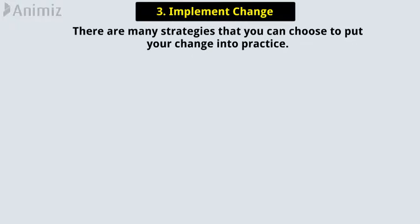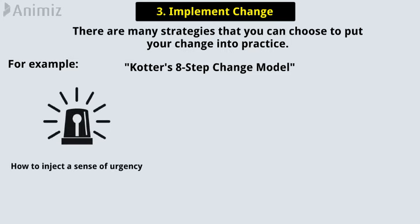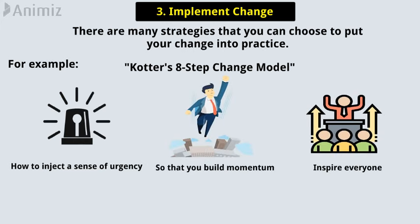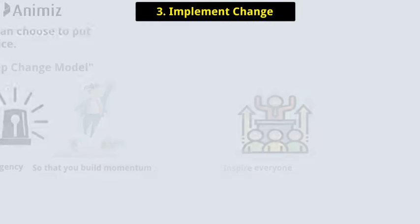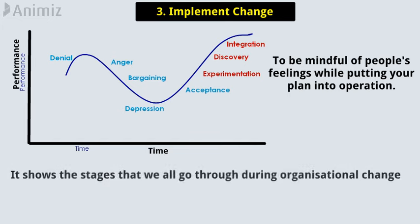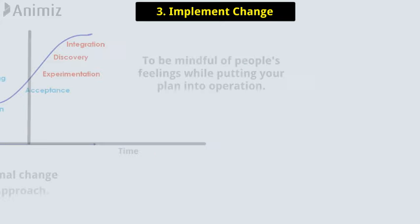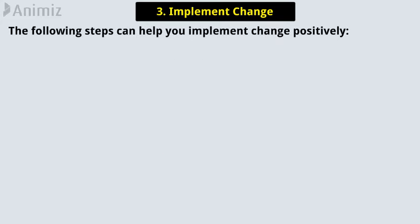The third principle is to implement change. There are many strategies that you can choose to put your change into practice. For example, Kotter's 8-step change model explains how to inject a sense of urgency into your actions so that you build momentum and inspire everyone to get behind your changes. Meanwhile, the change curve encourages you to be mindful of people's feelings while putting your plan into operation. It shows the stages that we all go through during organizational change, from shock and denial to fully investing in the fresh approach.